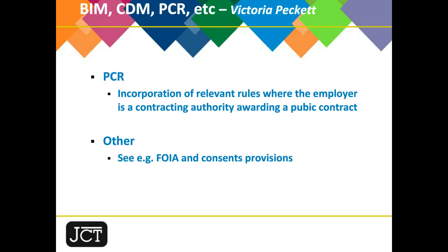There are provisions where the contracting authority needs to terminate a contract where, for example, there's been a substantial modification to it, or the contractor should have been originally excluded, or there's been a serious infringement under European law. So we've amended the termination provisions to allow termination of the contractor's employment in those circumstances.